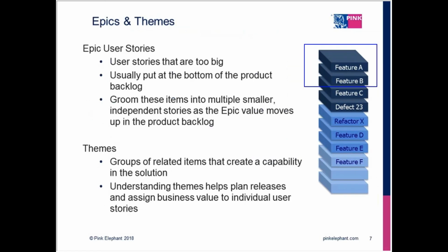So they're epics, and therefore they may be high level, and I haven't got to break them down yet because I don't know, am I doing feature E or feature F, right? It may change prioritization and sequencing during the project. So you have to remember there's no point in my doing detail work down here because I don't know if it'll still keep the same order by the time it gets to the top. Because in Agile and Scrum, you can always move things around based upon value. And at the top of the product backlog, that's where you can now break things down to smaller stories.